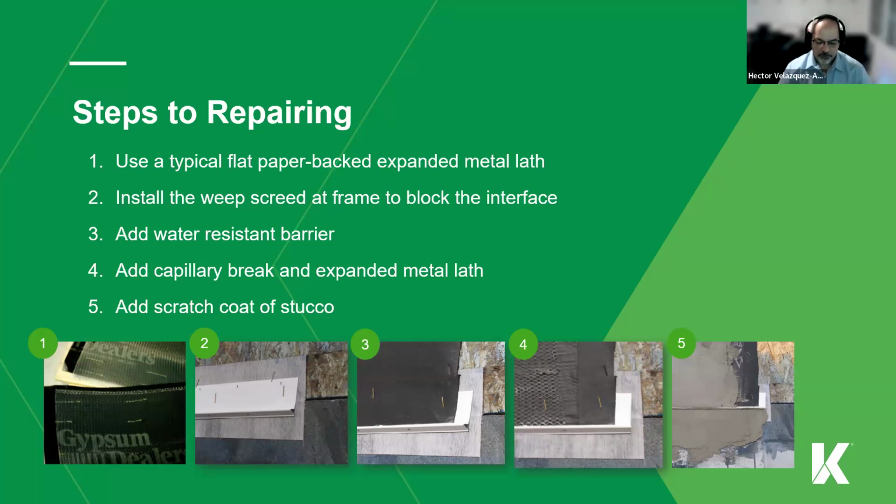I believe Nick was right on one major thing that people overlook: make sure that you understand what the deliverables are. What am I expecting to receive or to do? Because I can understand clearly, hey, I'm going to do a project manual and give it to you. Do you know what a project manual is? What does it cover? What is included? What is not? And make sure that you can sit down with your engineer and say, hey, you know what? I don't want to be touching the roof. Let's touch this. But my project manual was only about the roof. Well, whose fault is that? So let's be clear on what the deliverable is at the end of the day. That is critical for everything.